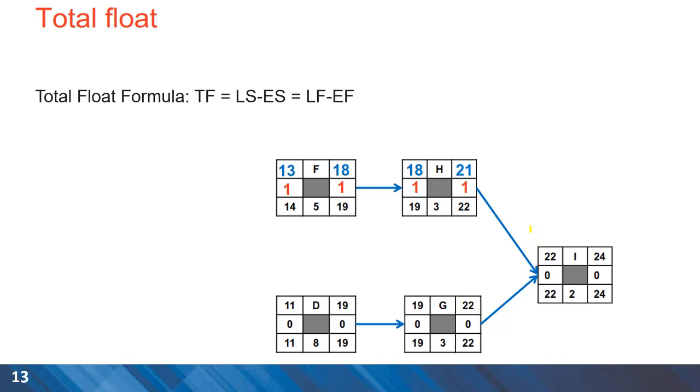Another example in here, and as you can see, some of the activities are on the critical path, so the total float is zero for them. And for other activities such as F and H, we have some float or slack.